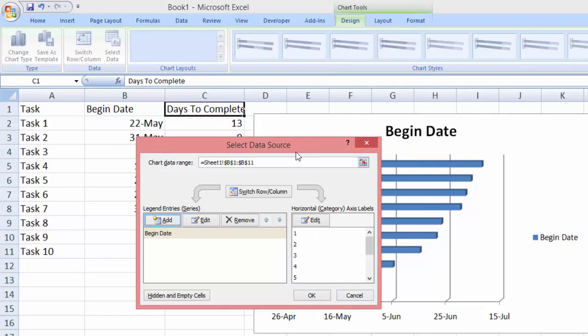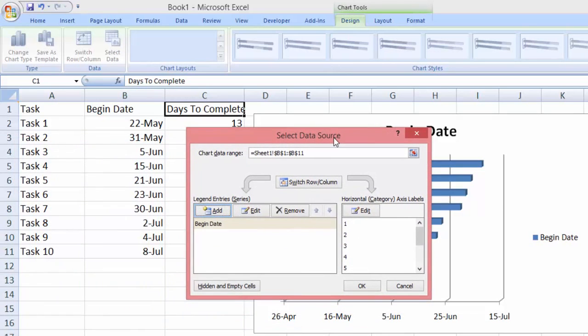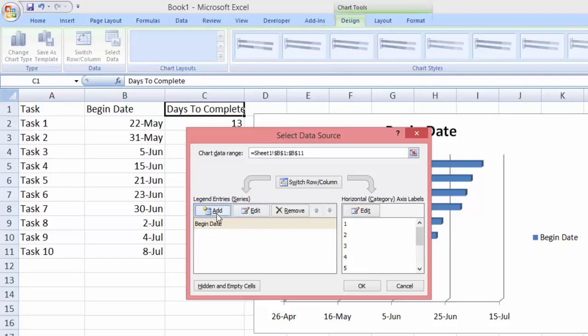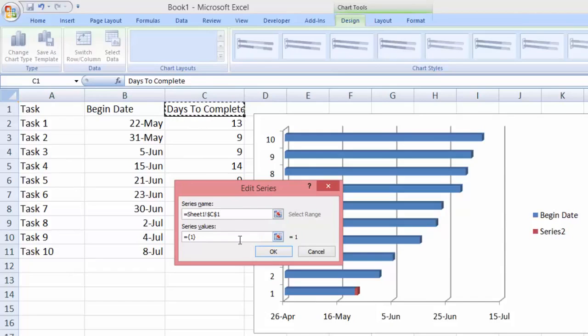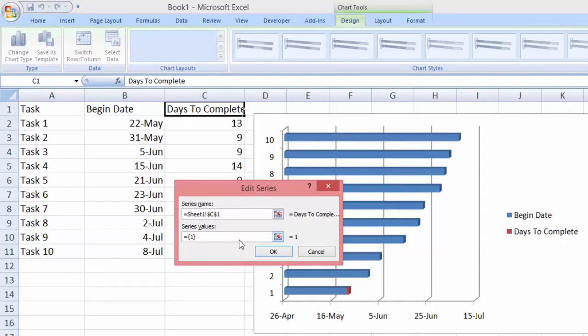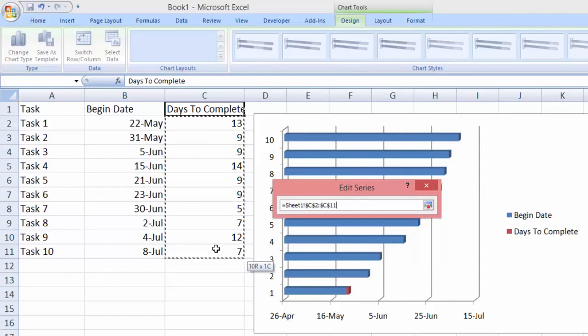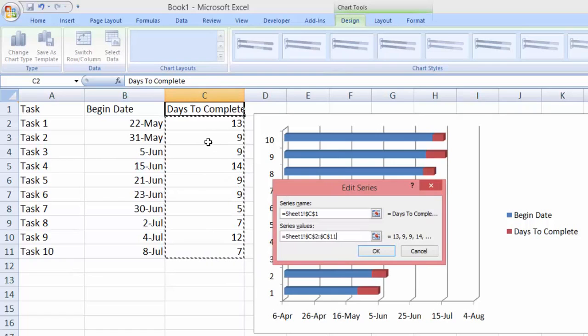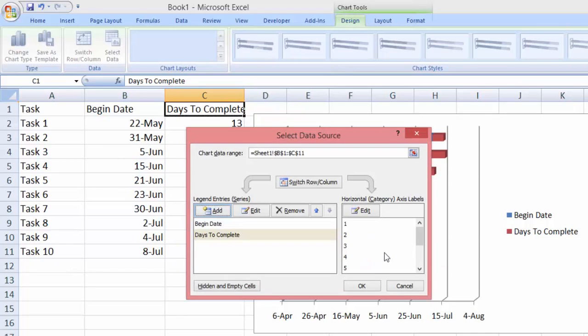Now you can see a chart generated here on the Excel. Next, let's go back to the select data dialog box and we're going to add one more entry. For this one I'm going to select the days to be completed, and for the series value just remove the default and select the range of data that is in this column, the same column as the series name, which is the days to complete, and click OK.